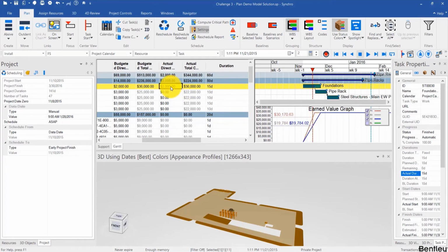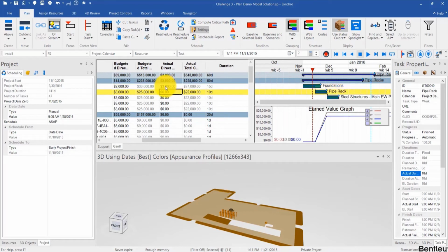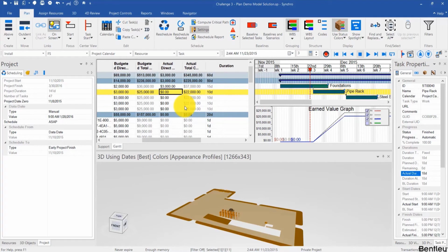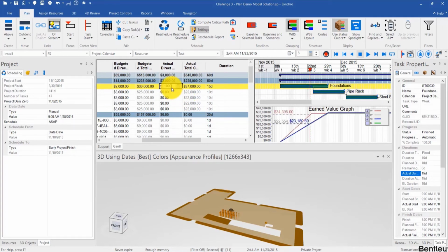That's talking about the earned value, and the actual value is equal to the earned value, which means we're on budget. If this is different, then going back to that activity, we go to a sample date, for example, this day over here. We should have completed more, we earned less, which means we're late, and we paid more, which means we're over budget. And if we choose a value that's lower, again, going back to that same activity, we should have completed $34,000 worth of work. We earned 22, so we're late, but we've paid 21, so of that 22, we're actually under budget, but we are late. So that's how to interpret actual costs.